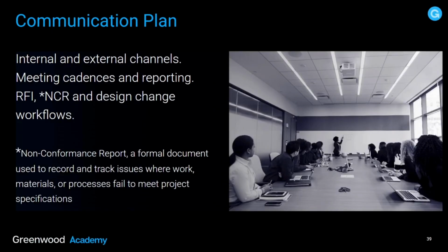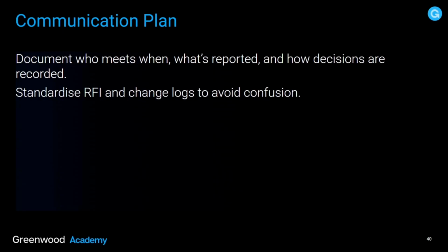Internal and external channels, meeting cadences and reporting, requests for information, non-conformance reporting, and design change workflows. Document who meets, when they meet, what's discussed, and how decisions are recorded. Standardise RFI and change logs to avoid confusion.